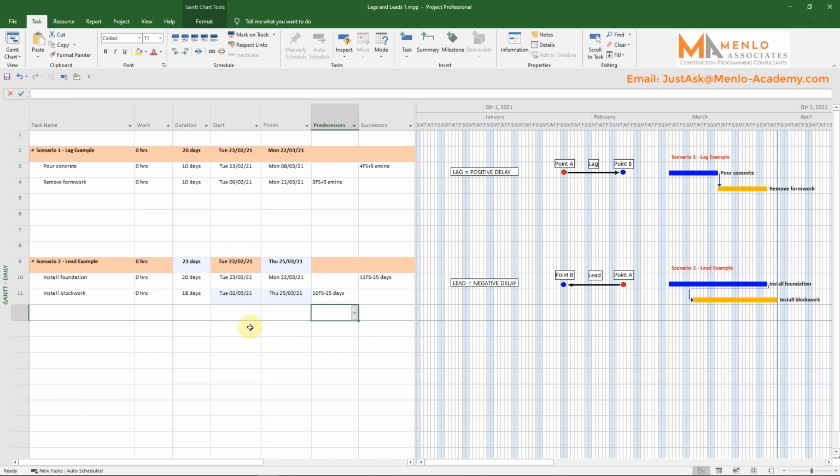It also needs to be said that we're creating a problem by representing all 3 of the bays with only 2 tasks. Setting up the program like we have it here makes it very difficult to detail how an issue with Bay 2 might cause an effect later on down the line. It assumes that anything that follows on from the works in the bays depends on all of them finishing, not just single bays as would be the case in reality. Using leads like this encourages us to set up the program tasks in a way that can make it difficult to follow real program logic and to illustrate any problems or deviations from the plan once work starts.